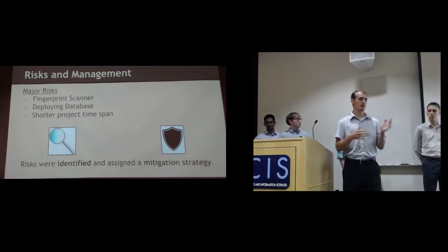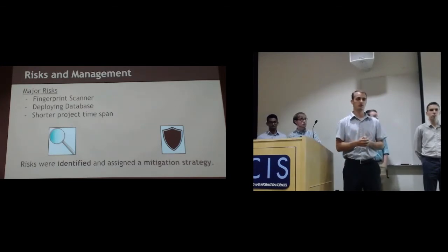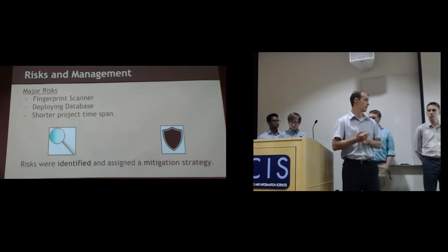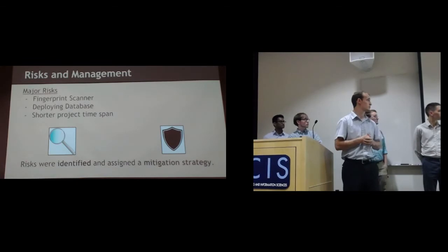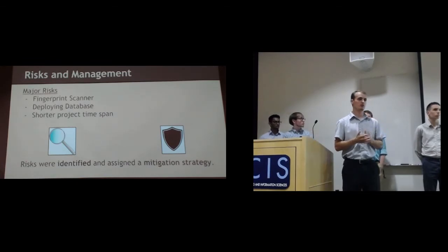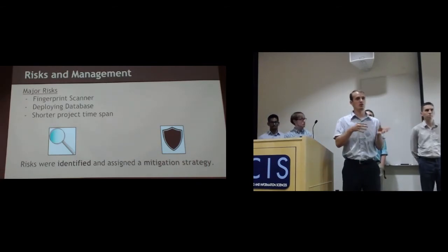And our mitigation strategy for this risk was to work very closely with developers at the manufacturer of the fingerprint scanning company. And in that way, they'd help us develop a product that will work with the rest of the solution. Deploying the database was also something we were concerned about. We mitigated this by sticking to technologies that we knew were already in use at Trillium.